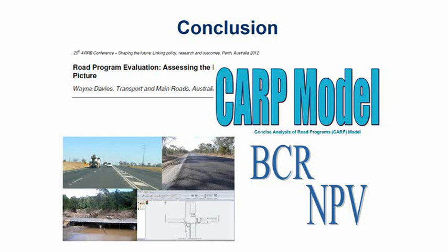Another way of looking at it was to include the projects until the value of the program actually dipped below 1, which wouldn't have been too many cut out. But if you look at that in terms of flooding projects, quite a few of those would have included that if we had it as sub-programs within that program. Another proposed approach, actually in the paper itself, was to look at it in terms of a lower cutoff point for the benefit cost ratio. Maybe not use 1, but maybe use something like 0.8.